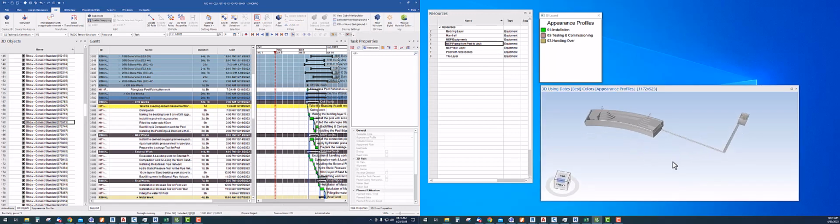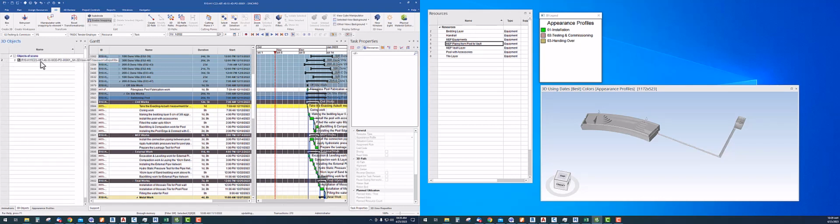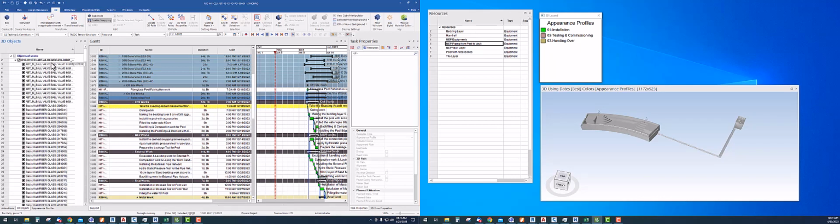Understood? Okay. Now I have created my resources. So first thing I did, I loaded my 3D objects, deleted which I didn't want. Asset 47 was there, I didn't want. Now after loading, I assigned by manually selecting to the resources. Now the third step will be to assign these resources to the task. Okay. Now this is 3-bedroom dune villa.